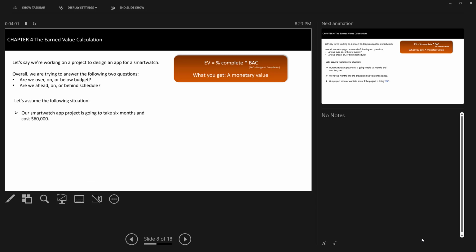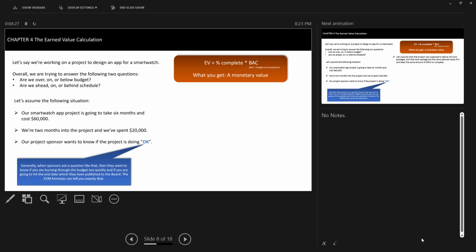Let's assume this situation. Our smartwatch app project is going to take 6 months and it's going to cost us 60,000 USD. We are 2 months into the project and we have ended up spending 20,000. So the actual cost is 20,000 so far. Our project sponsor wants to know if the project is doing okay. What he means by that is to see whether we are burning through the budget too quickly.